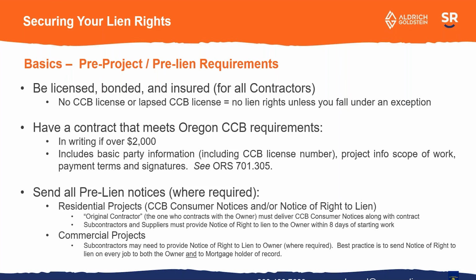There are also what are called pre-lien notices. You have to send those before you start work, which would be the CCB consumer notices. There's like a 3-pack of notices if you're working on a single family home. I'm sure you know what these are. And those need to be delivered to the owner along with the contract.